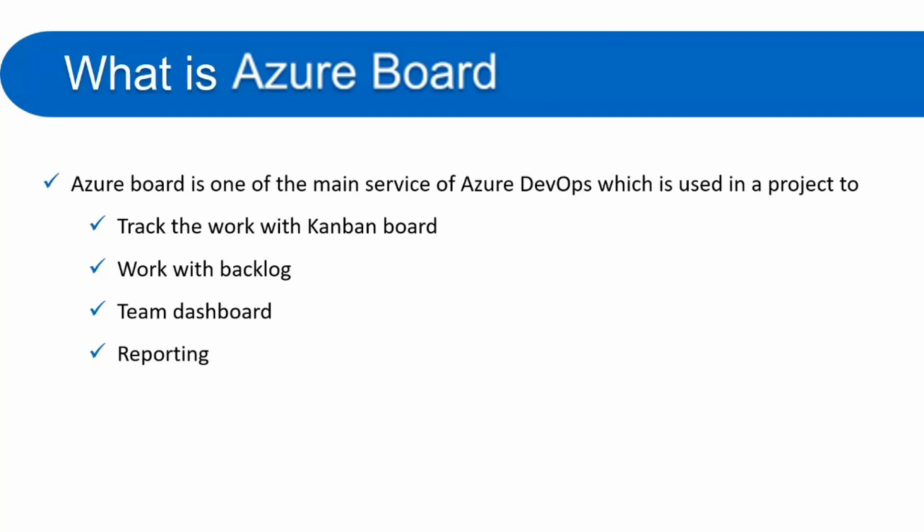It enables the team to keep track of their tasks, work status, user stories, backlogs, features, and any problems or flaws discovered during the projects. Epics, issues, and tasks are the three primary work items of Azure Boards. Whenever you will be working on a project in Azure DevOps, then you will need an Azure board. And inside the Azure board, you can create and manage a Kanban board.